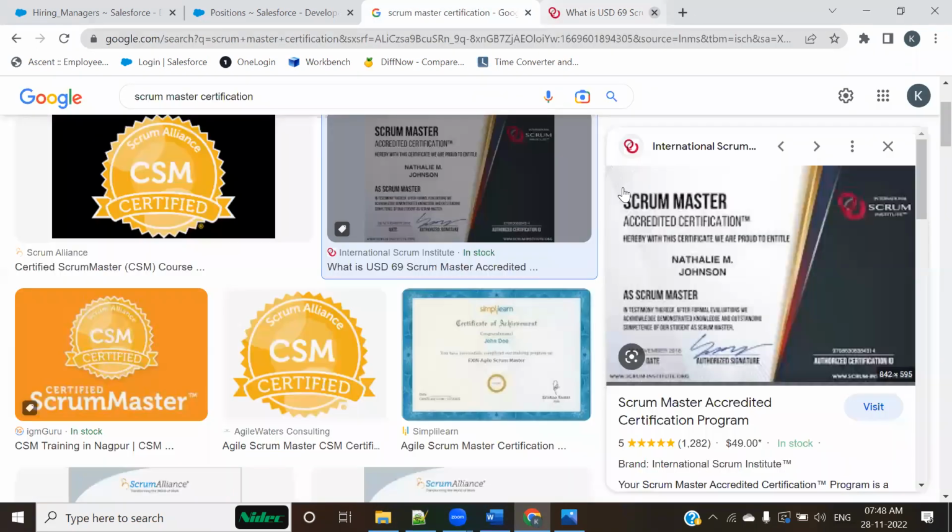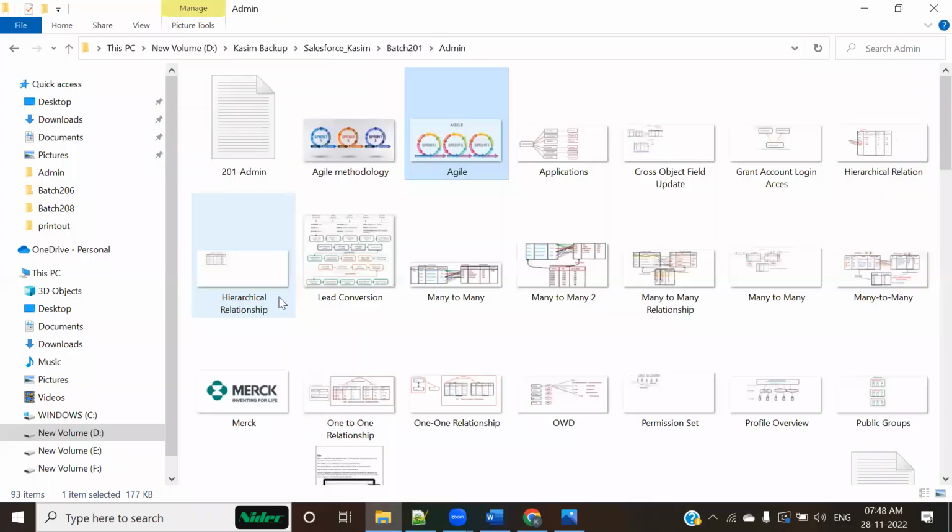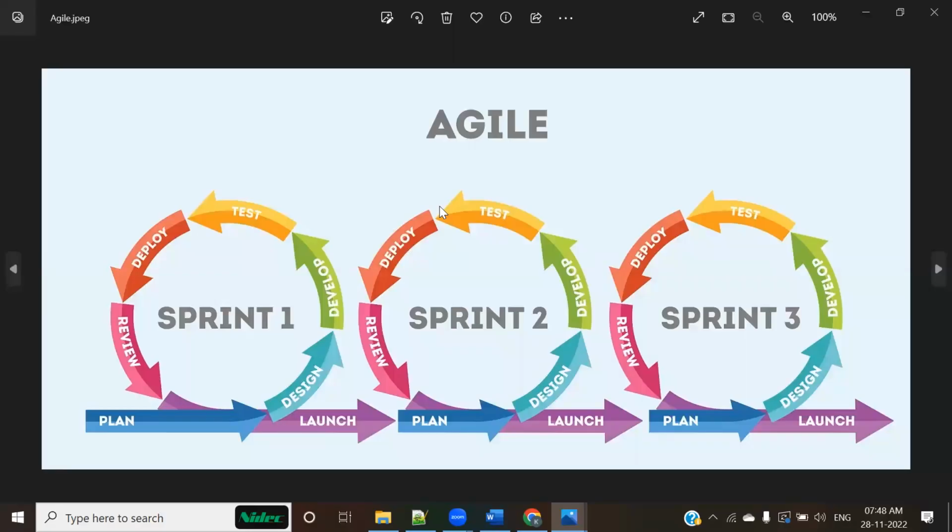And they would modularize your whole product into different sprints. So after every sprint inside the agile methodology, we submit the product for CR, client review. We submit it for client review, and we ask the client to test it in their own environment. We create the environments for them as well. We also have our own environment, and these environments are always sandboxes.